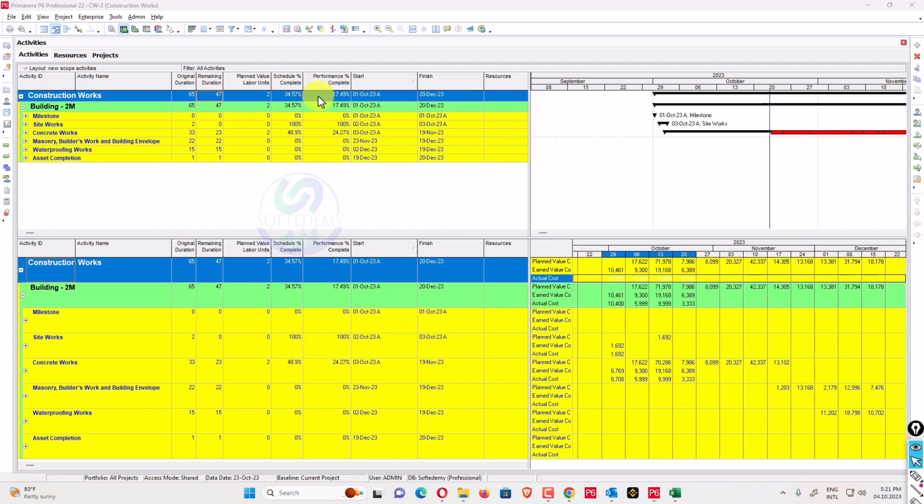So EVM basically focuses on three points. One is scope management, the other one is cost management, the third one is time management. So these three things will periodically impact how much work you have done. When I talk about the two variances, what is the cost variance? It's understood when you are talking about cost: when you deduct actual cost from earned value, you get a cost variance.